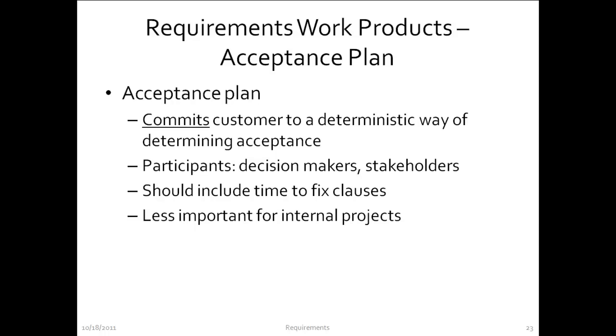And then typically in these acceptance plans, there is a time to fix clause. So, there is some wiggle room here in the sense that the customer might say, okay, you think you passed this test, and I agree that, from your perspective, the way you understood it, the test passed. But I really meant this slightly different thing, and it doesn't seem to be that different from what you thought it was. So could you please fix it? Or it could be a test that you genuinely missed because you missed some situation where your software would fail. So typically an acceptance plan includes time to fix clauses. We will fix any bugs reported within 30 days, things like that.